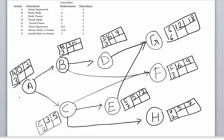I have one initial activity, which is A, and three end activities: G, F, and H. These are the end activities because no other activity in the project follows them. At this stage, the maximum EFT among the end activities is the project's completion time. Between seven, nine, and eighteen, since eighteen is the highest, the project completion time is eighteen days — meaning the earliest you can finish everything is eighteen days. Therefore, the latest finish time for all end activities will be eighteen.